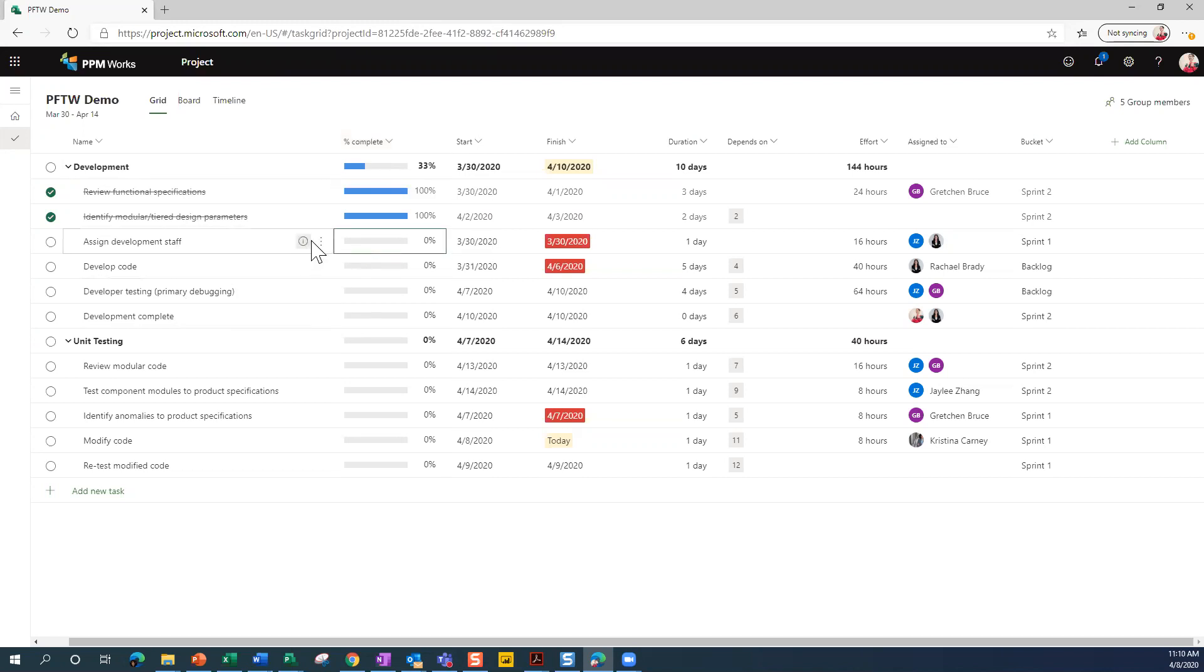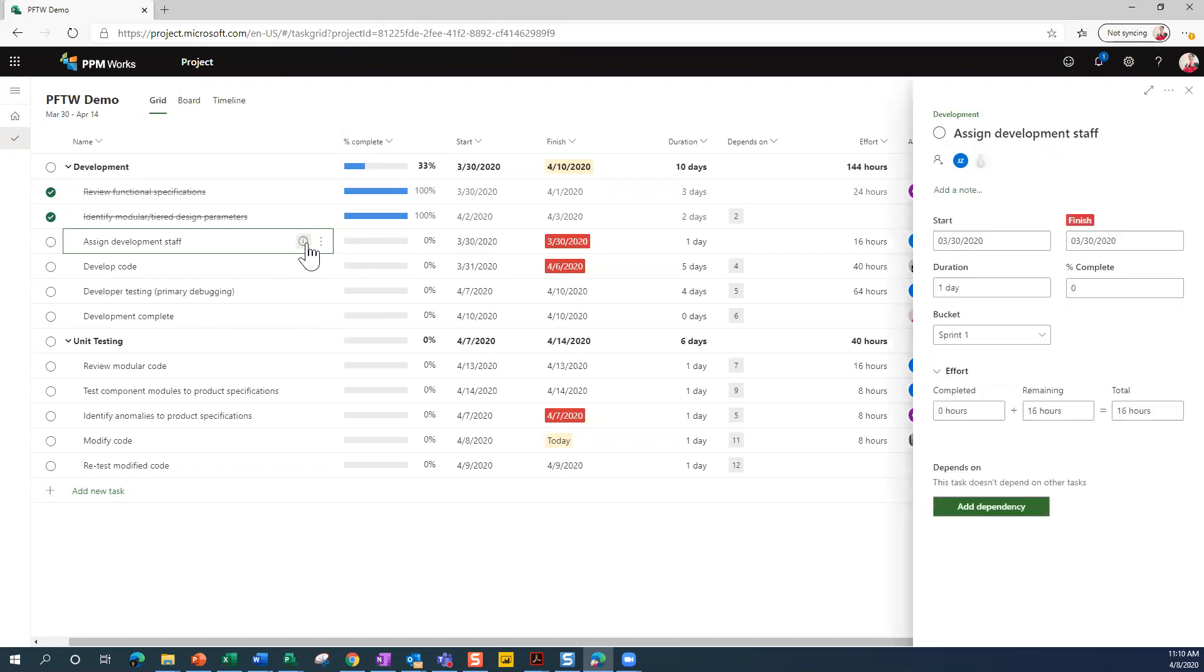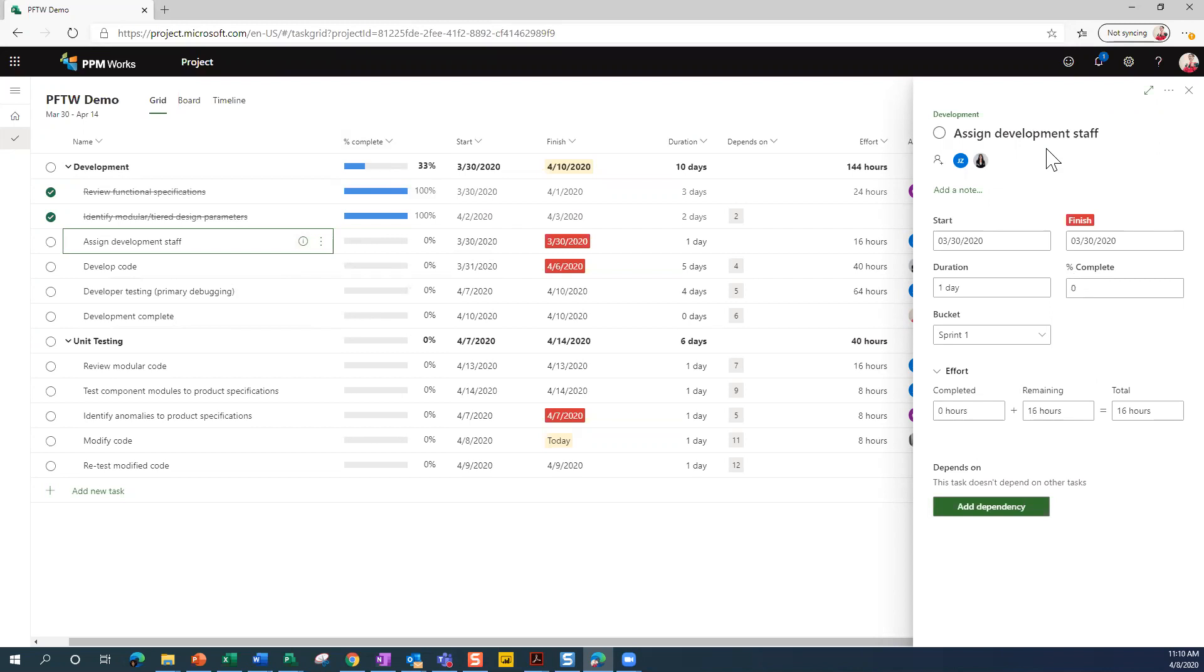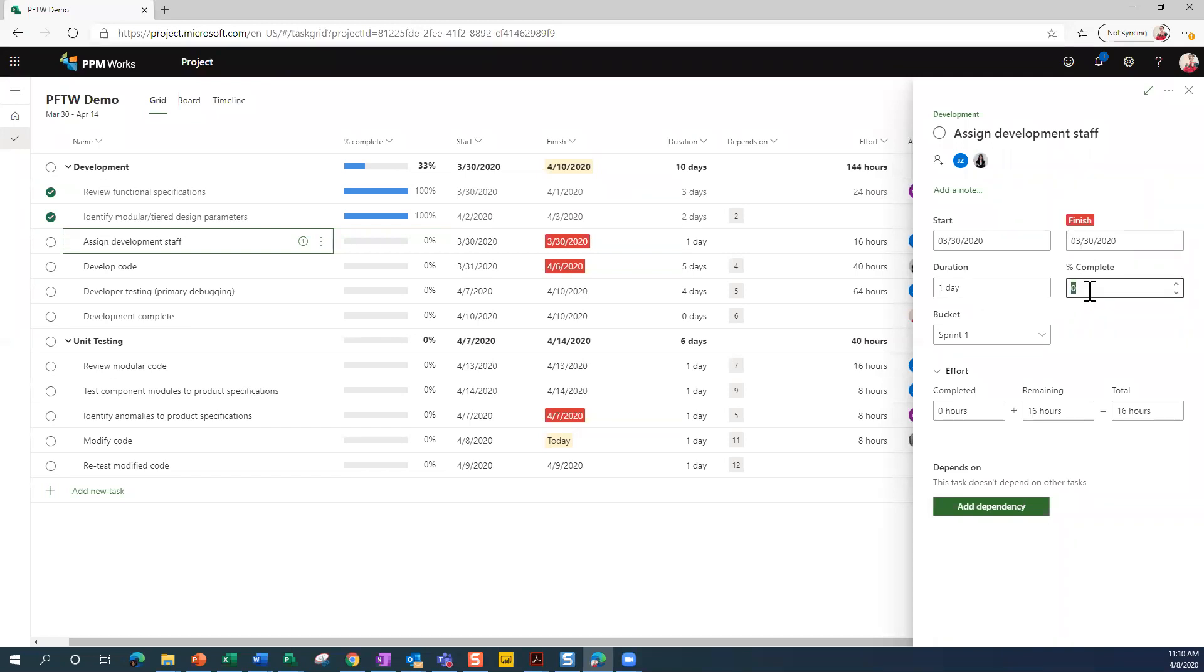Now, if I wanted to go in and adjust that percent complete, I can click on the ellipsis and go to details or I can just click on the little information icon. And over here, when you're looking at the detail screen, you'll see you've got start and finish. You can update that there as well. You can update duration, percent complete is right here. So I'm just going to type in 25% complete.